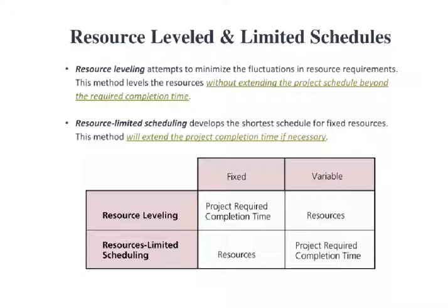We need to ask ourselves, if there are limited resources on the project, how are we going to go about managing those? An initial step, as we've discussed, is to build that resource limit or resource constraint into the network diagram. But we have the ability to change the network diagram and rethink our plan to try to better utilize resources.